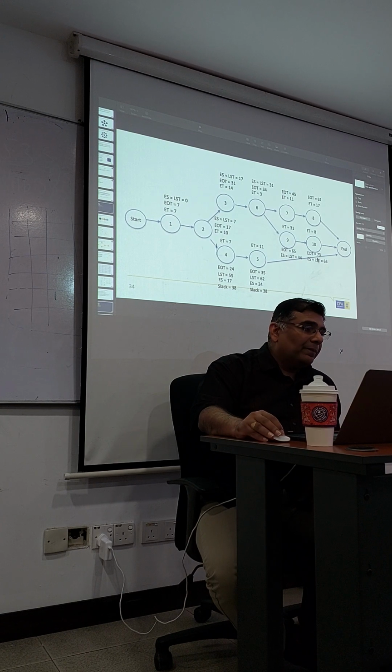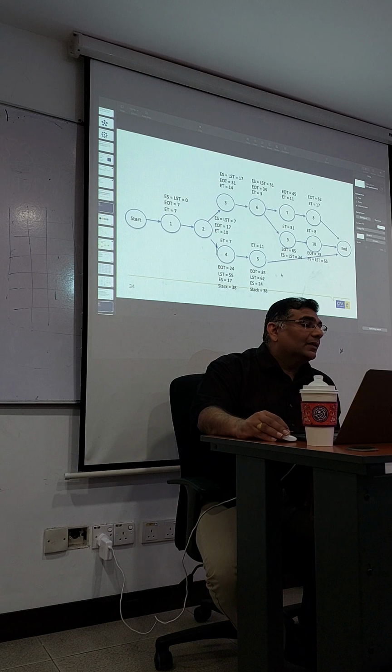Okay, repeat that. 73 minus 11, you get the LST. 73, critical part, final number. Minus 11 get 62, correct? 62 minus 7 you get 55. Earlier start time, you just follow lah, EST here. Are we okay this part?